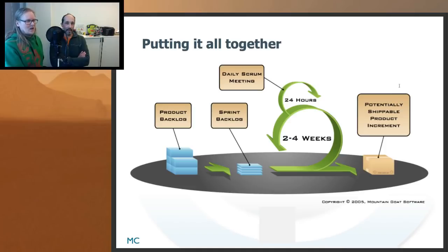Okay, here's basically the same picture in a simpler, stylized format. So there are the key elements except the sprint planning, review and retrospective. But the overall Scrum, if you want to call it a process structure, is really simple, as you see. This is all there is. These are the key work products. We simply have the product backlog that is elaborated in the sprint backlog, and based on the sprint backlog, we make the new increment of actual working software.